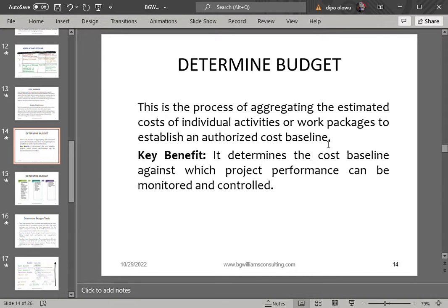Now I know what it will cost us in terms of all the little tasks that need to be done for foundation. So also you carry out cost estimates for all the little tasks that you will do for flooring. You carry out cost estimates for all the little tasks for block work. You do your cost estimate for all the little tasks you do for roofing and other things.